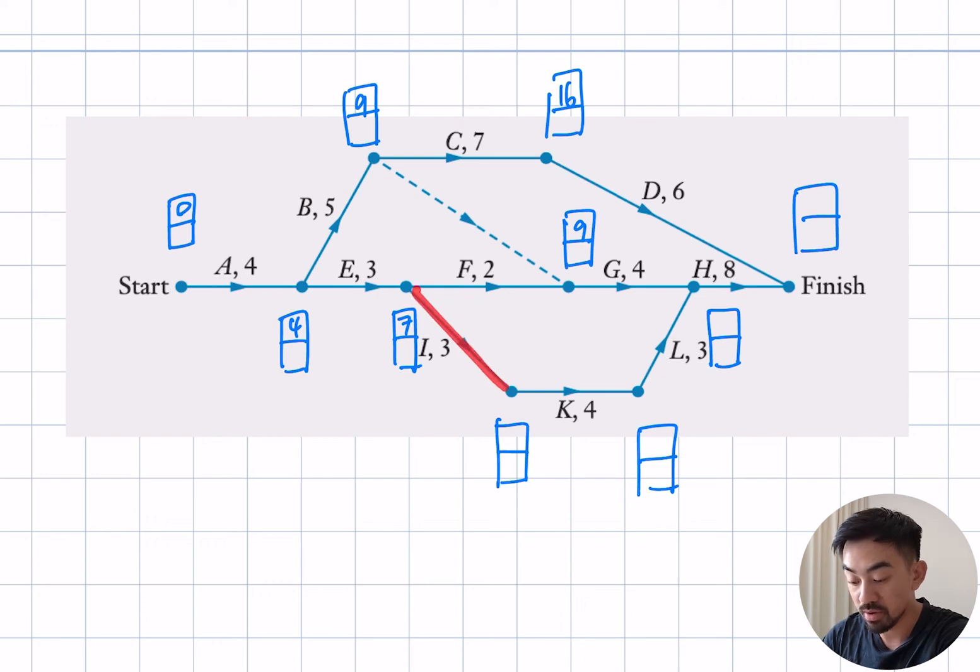Okay, moving down here, 7 plus 3 is 10. Moving along to K, 10 plus 4 is 14. Need to make a decision here. Is it 9 plus 4 or 14 plus 3? It's going to be 14 plus 3, right? Because that's 17. And then finally, is it 16 plus 6 or 17 plus 8? Well, 17 plus 8 because 25 is bigger than 22. 25.